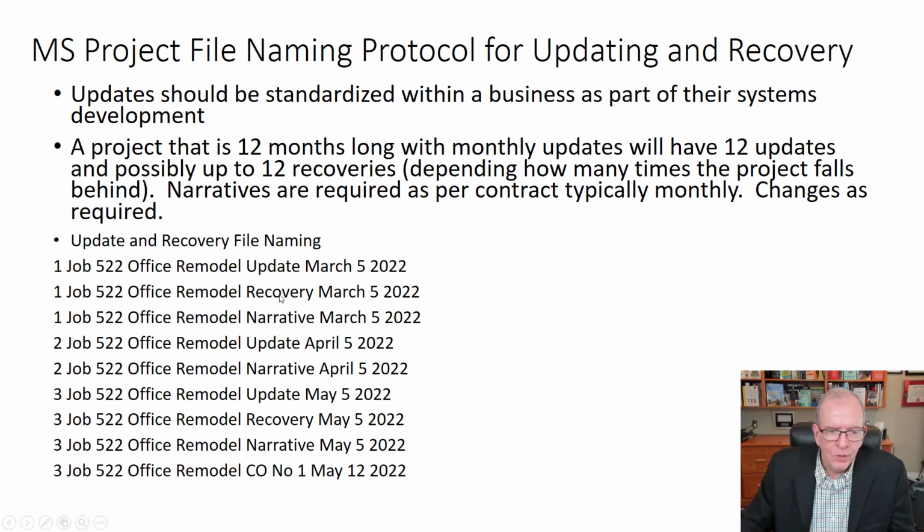I'm updating. I'm recovering. Or it's a narrative. We'll talk about narratives in another section. That's what you're trying to explain, what happened in the project. So this just repeats itself. Update. Now in this case, maybe I just did an update and I wasn't behind schedule. Well, I don't have to do a recovery to get the time back if I'm on schedule. So we're good in that case. And then a narrative. So sometimes you have to do a recovery. Sometimes you don't if everything's running the way that you want.